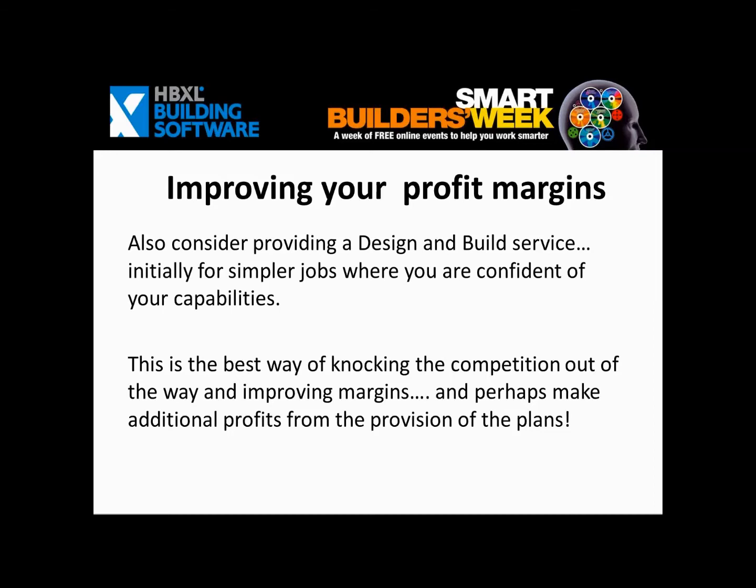You need to think about wastage, breakage, and theft. Everything is subject to this. In our software, we even allow a wastage factor on things like toilets and windows. You may say, well, how can you waste a bit of a window? Well, of course you can't, but over time you will find that some of them will get damaged or they'll need repairs doing to them. So you need to have that built into it. And again, you have to have a methodology for doing that.